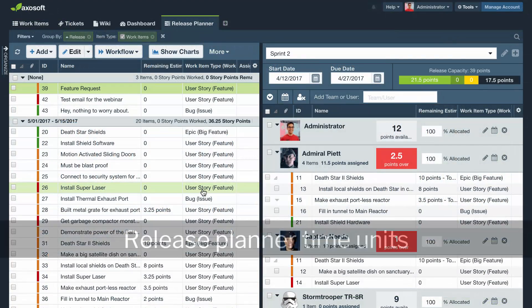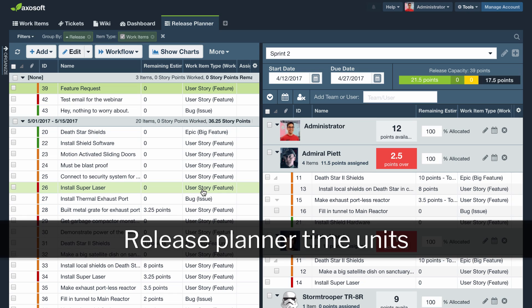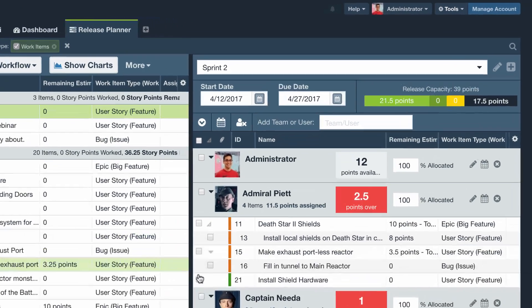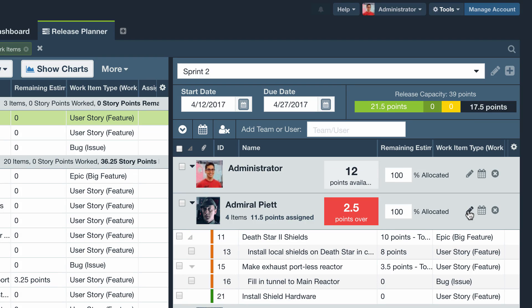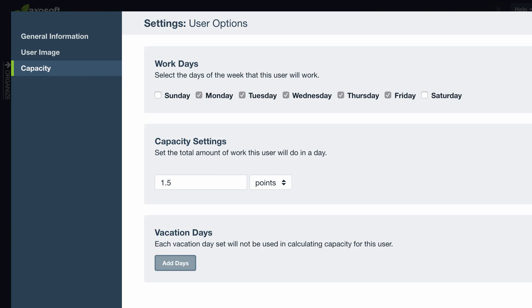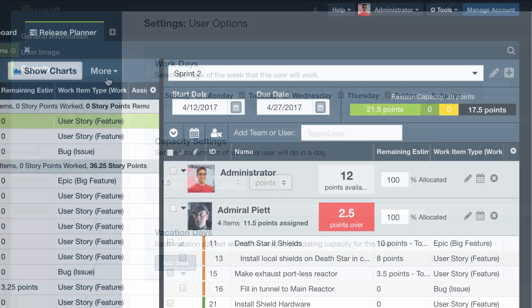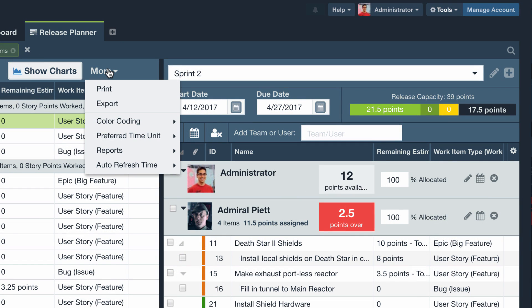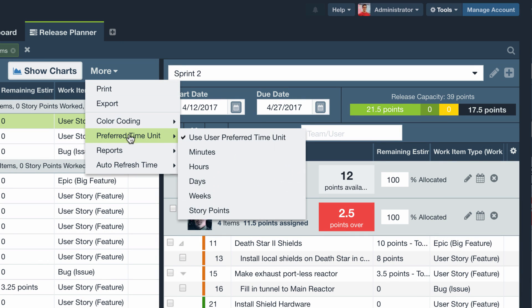The release planner has also been updated and now supports other time units. Each user can set their capacity in terms of other time units like minutes, days, or story points. The release planner will also honor the time unit set from the more menu of your toolbar.